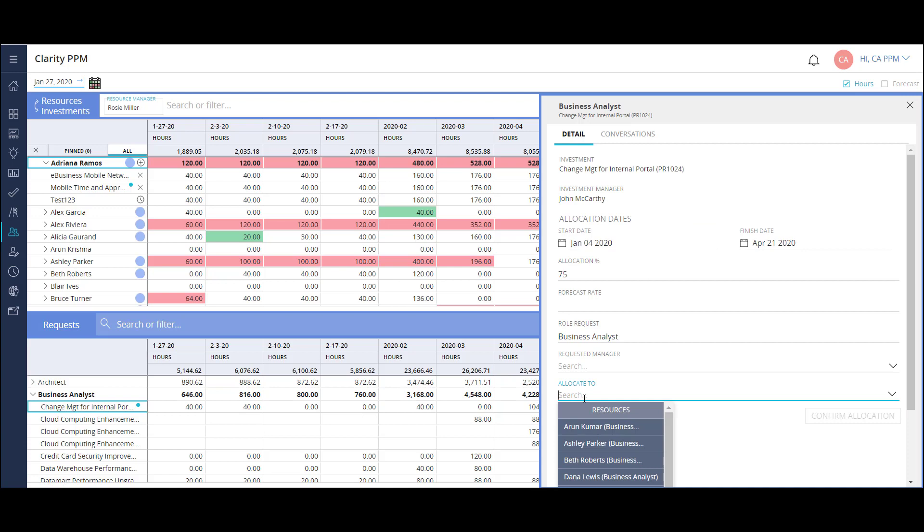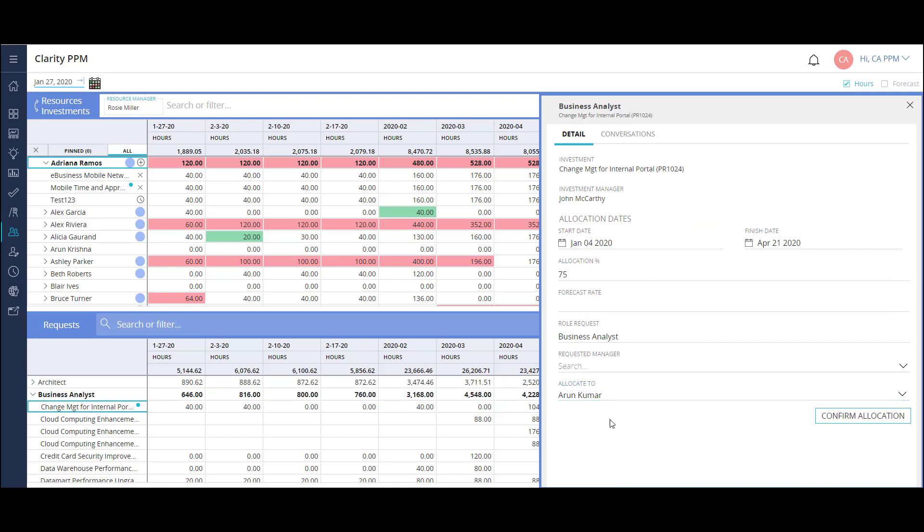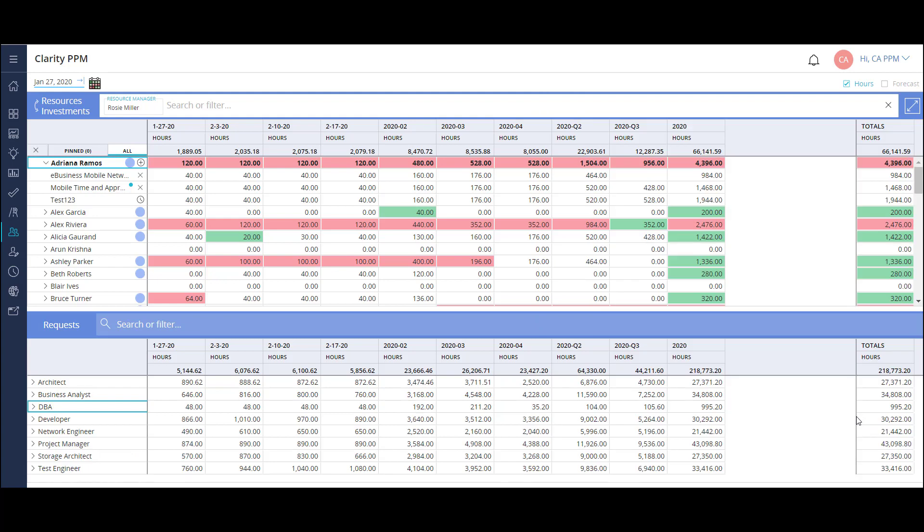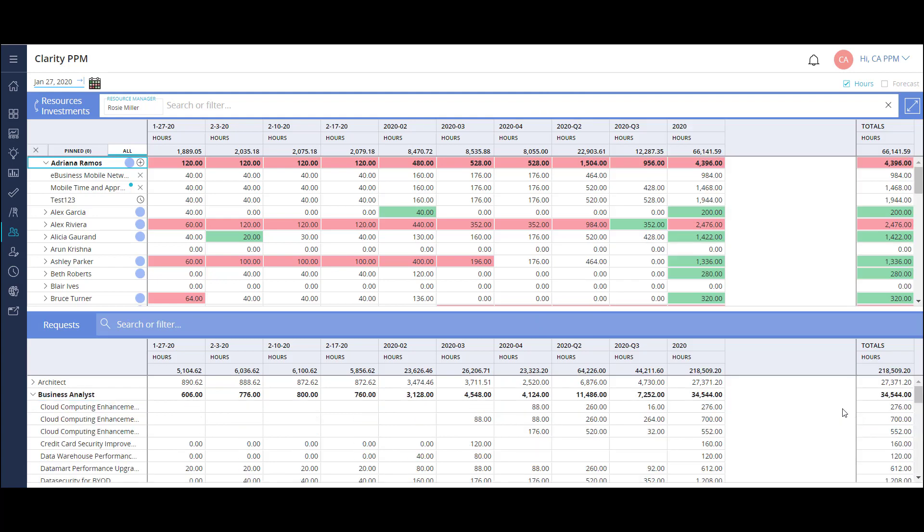When I want to replace the request with a person, I simply add them and confirm the allocation. This will allocate the resource to the project for the requested period of time and remove the request from my list. This is a great single dashboard that shows how I can manage resources at the project level. Now let's look at how we can manage resource plans at a broader level.